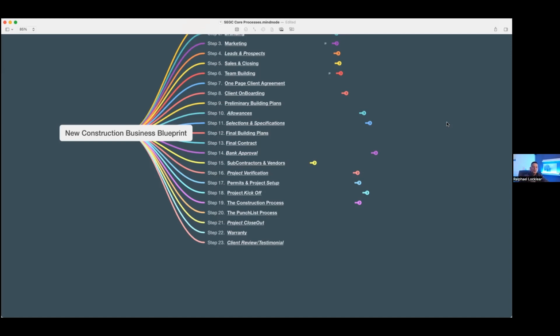Then when we schedule with the subcontractors, a lot of times we're going to meet them on site also until we figure out what the issue is. And they get a 1-year warranty. So it's almost like they're getting white glove instant service through instant communication. And at that 1-year period, at the 11th month, we go back in and meet with them. If there's anything that needs to be handled, we handle it then.